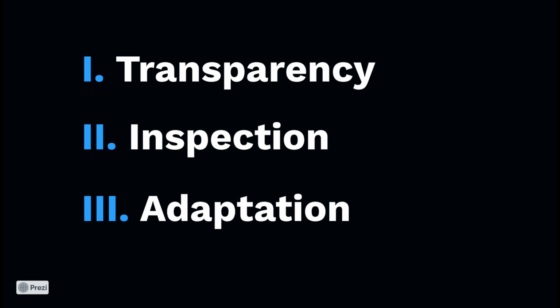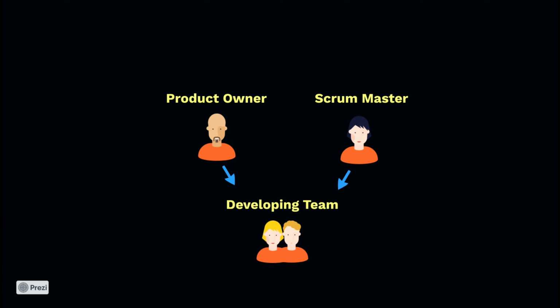Scrum also defines different roles that exist within a Scrum team. Here are the key roles. Product owner. This is the person who defines the product requirements and sets priorities. They represent the customer's needs. Scrum Master is responsible for ensuring adherence to Scrum practices and rules. They help the team solve problems and promote continuous improvement. Development team. The development team consists of professionals who actually create the product or work on the project. They are self-organizing and collectively responsible for delivering the product or project.